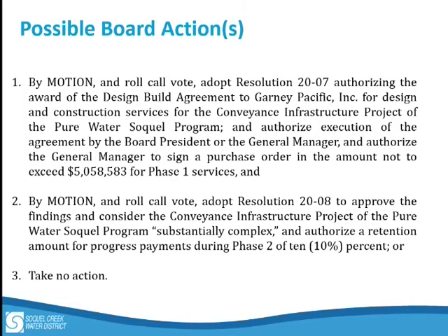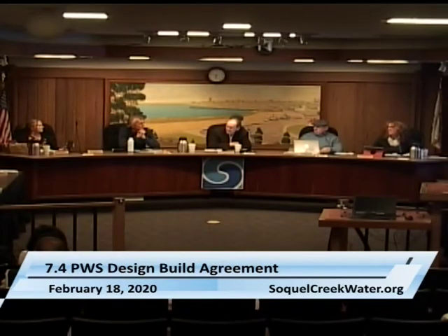That's what their schedule shows, and that's the right approach considering the milestone completion date of July 1st, 2022. We don't want that to be holding up startup. There are certain segments in the coastal zone that will have to wait until we get the coastal permit, but the majority of that can be done coordinating with the county and the city. And once that's finished, then they can move forward with the purified pipeline. But that is the critical path item for them.